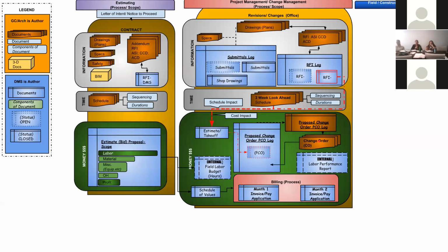And once the change order has been approved, we change the status of our PCO to now closed. That PCO feeds the accounting team, it feeds the field team, it feeds all the teams when new money has come in. And it leads to our payment process. When a change order comes in, it has to revise our billing and be incorporated into our billing where we can collect it. And we're only able to bill once a month.